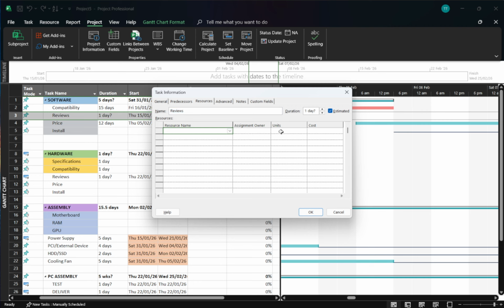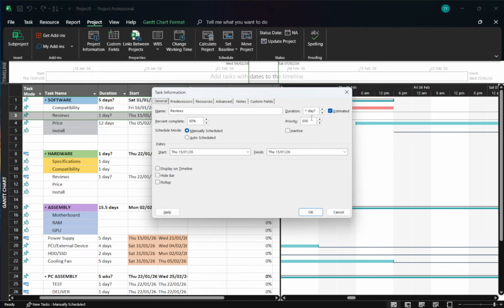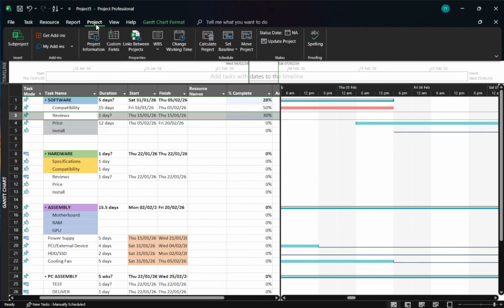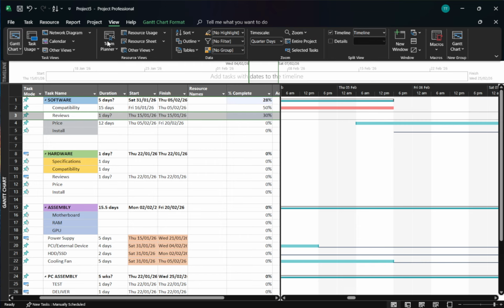Keep the schedule healthy by updating project status regularly. Open the Project tab and choose Update Project. Use options like Update Work as complete or reschedule unfinished work to push remaining tasks forward when they're late. Frequent updates help you catch issues early and keep the timeline realistic.